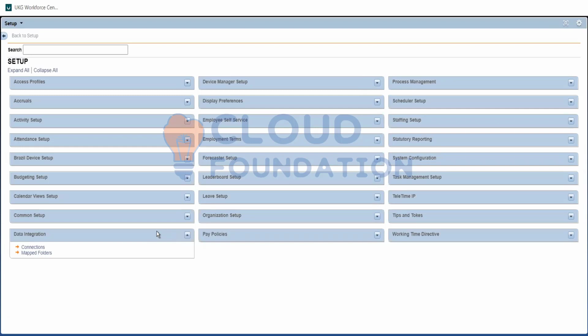Integration-wise, it depends on the client. Most clients use only simplified integration, like loading the people into the system, and payroll is the same for all the people in a particular instance. Other than that, there are a few fine-tuning integrations, and it won't take more than 6 to 8 months. Say you have 3 people: you can use one dedicatedly for integration, and 2 are enough for configuration.